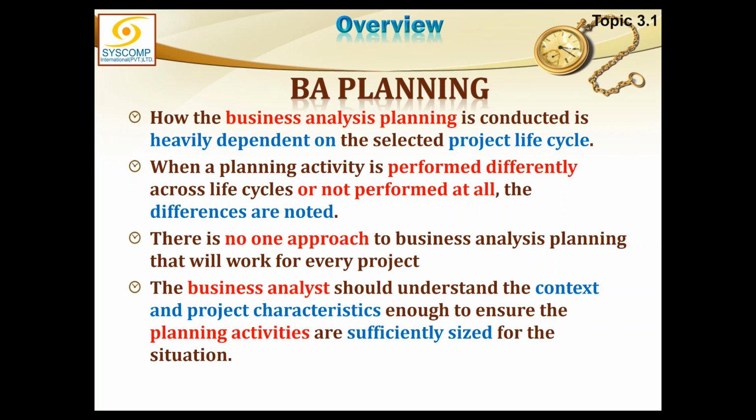That could be constructing the gray structure. Gray structure means the building itself, right? That could include the construction of walls and plastering and masoning, etc. Once the superstructure is ready, that will be the finish of my third phase, and the output would be the gray structure completely ready. But that does not mean it is ready to occupy. So you do the finishing touches, you put in the doors and other electricity and other things, paints, distempers and all those things, and you make it yet another phase. That is your fourth phase.